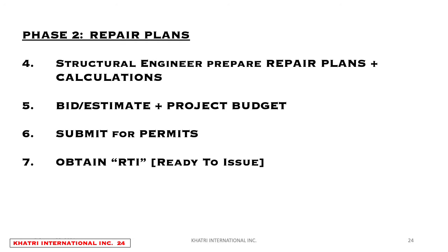You will jeopardize your ability to recover loss in the future. And you take on the liability that if someone gets hurt because you did it without permits and without the right process, you risk being liable for those decisions. So you've got to get permits and approvals on your project. It's very important.